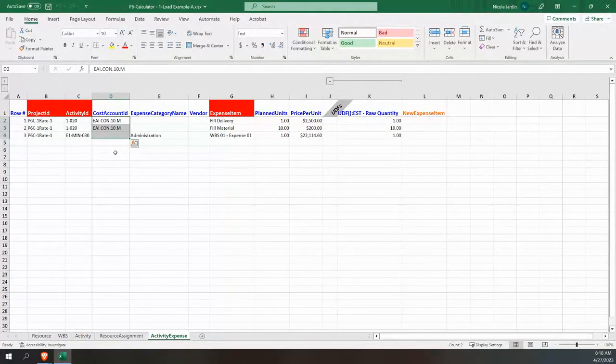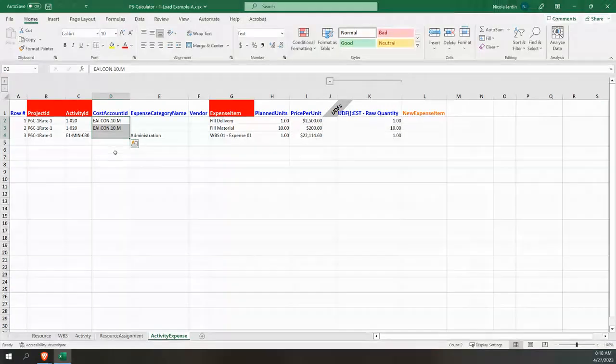Okay, so once we've coordinated with estimating how we're going to share data, okay, and get a standard in place, that data can be output into a format such as this. So this is our loader format, so that we can import it, okay? You can't import directly every single aspect easily into P6, and you sure can't get it out in a nice, simple to use one spreadsheet that does all of it. And P6 Loader also lets you cross multiple projects into one spreadsheet, okay? So that makes it huge in terms of managing your data, much, much easier.